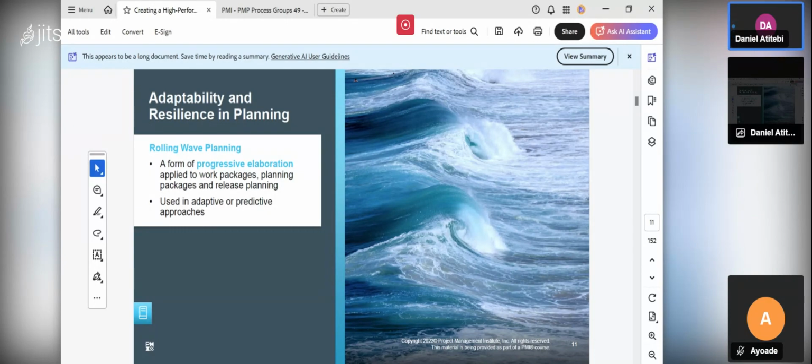If I'm going to build an application, all the features and functionality, the user stories, work items will be broken down into smaller units in the product backlog. The most important work we are going to do, we place at the top of the product backlog. That is the first thing the developers are going to do during the sprint to start their job, to produce an increment or a part of the deliverable. But when you're talking about plan driven, you can call it work packages. When you're talking about it in the change driven, you say product backlog.